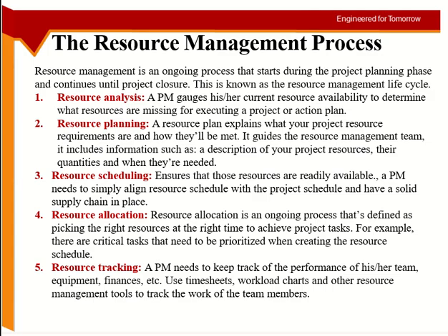At this point you also need the quantities. So how much labor, how many equipment, how many tools, how much material, and so on. Then you schedule them. I need this much resource and this is where I will get it from, and resource scheduling means when you will get it. This is where